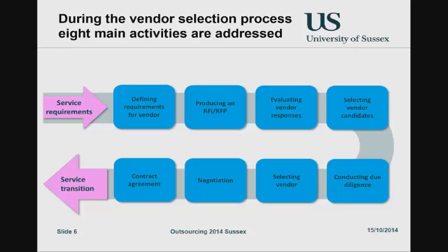And when the vendor has that, the vendor is very happy with that, to be quite honest. I was very happy when we had a detailed statement of work from the buyer. We then knew what we had to do. So we knew our scope, because a problem we always have during contracting is this definition of precisely what is the scope of what you need me to do. Make sense, Christian? Yeah? We are a friendly buyer here, so that's always useful.